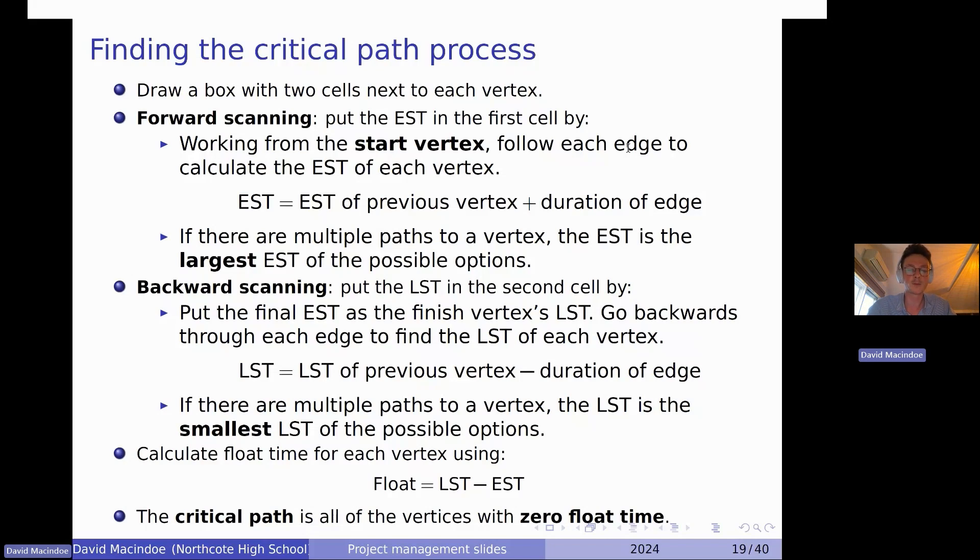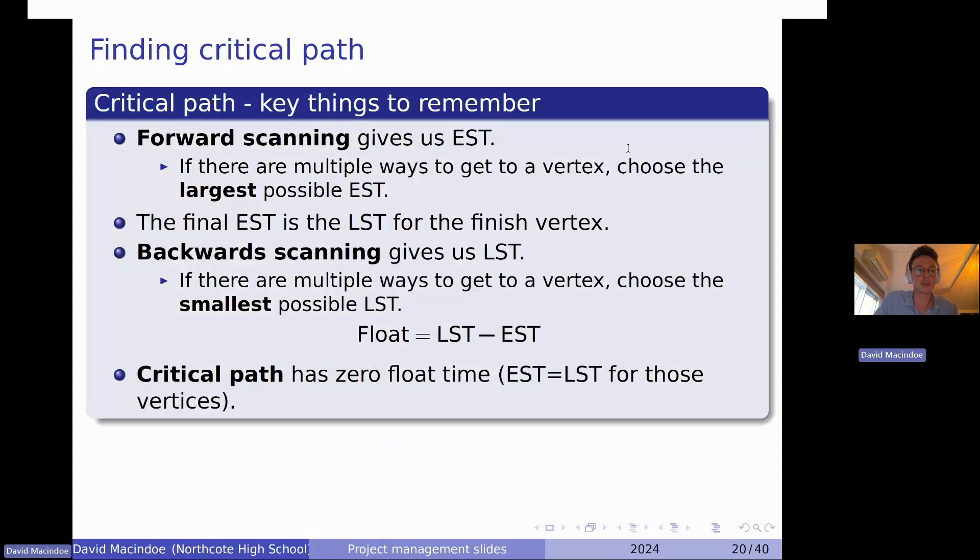I think the float time is pretty straightforward. You're just doing the LST for that vertex, take away the EST. Now, the critical path is the path that has no float time at all. So another way of thinking of it is really it's when the LST and the EST are equal, when they're the same. There's going to be no float time. I've also put this as probably what I'd have in my bound reference of just the key things to remember. I find the things that I forget is whether it's the largest or smallest when I've got the multiple paths coming together depending on whether I'm forward scanning or backwards scanning. So I'll keep that just as a quick reference for myself during the exam.